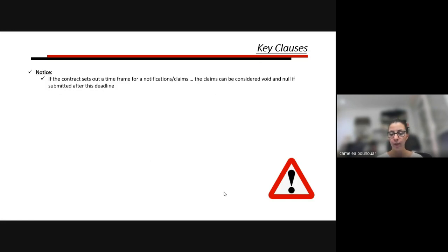The notice clause is a very important clause. In some contracts there is a timeframe to give notice, and if you don't notify within this timeframe, your claim becomes void and null. Even if you have accrued costs and damages, you cannot claim them because you didn't submit at least your notice of claim within the timeframe defined in the contract.